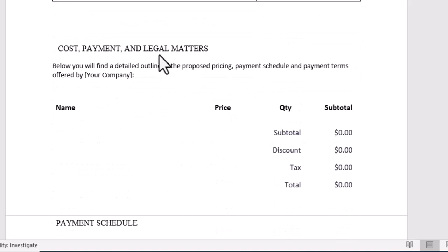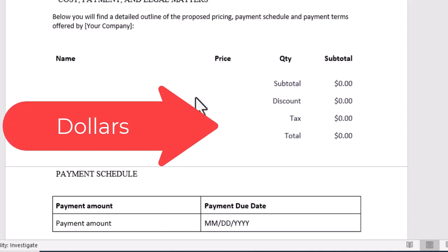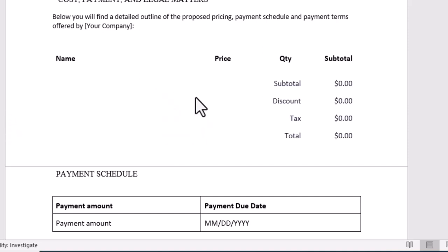And next is when it comes to cost and payment. Okay, so how much for this proposal, for this application, for our team to develop, how many hours we have to spend. We have to calculate everybody's hours here, a business analyst, a developer, tester, project manager, everybody's hours you need to calculate, and you need to give them a price.